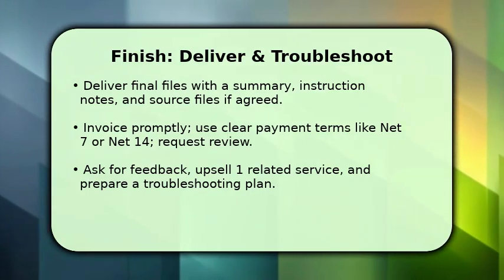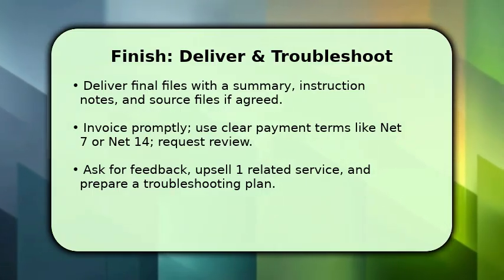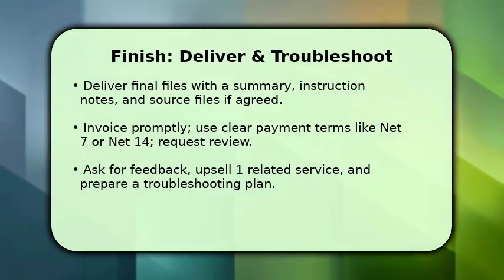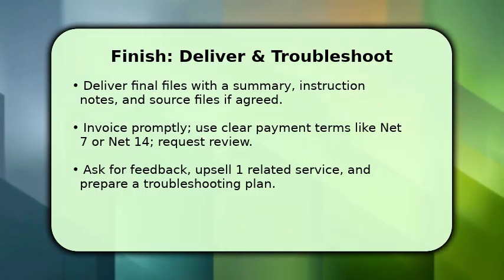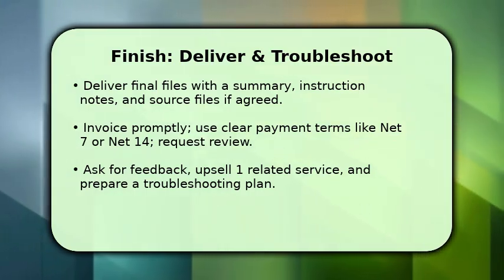If things go wrong, missed deadline or scope dispute, pause, communicate the issue, propose a concrete fix with a new deadline, and document the resolution to protect future work.